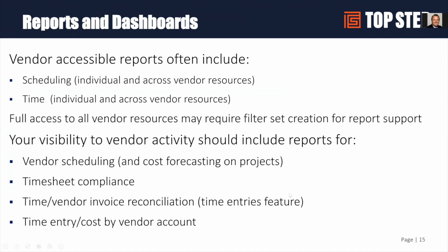We have some customers that don't get invoices from their subs. So they actually just pay based on the time entered. And that's another good way to use this time entry feature, to say, okay, I'm going to go ahead and reimburse for all of these time entries and mark those as reimbursed. And as you do this on a regular basis, you're only picking up new time that hasn't been reimbursed yet. And then obviously being able to get your time entry and cost by the different vendor accounts.